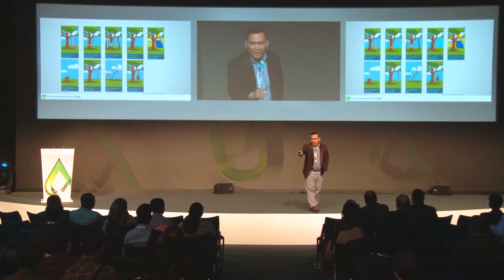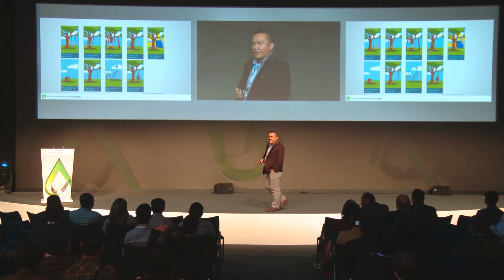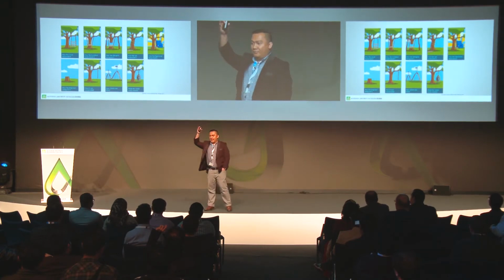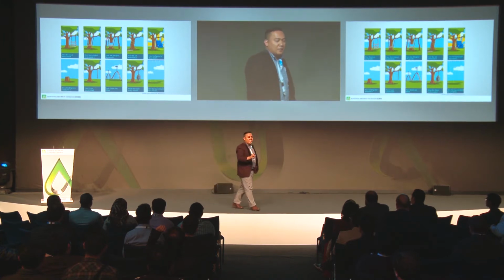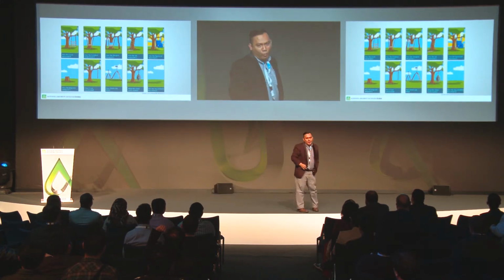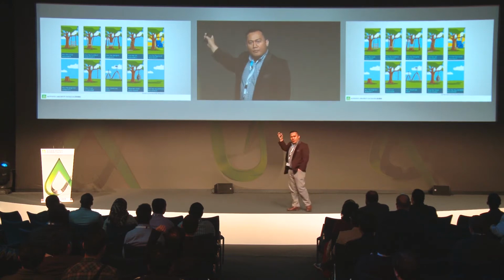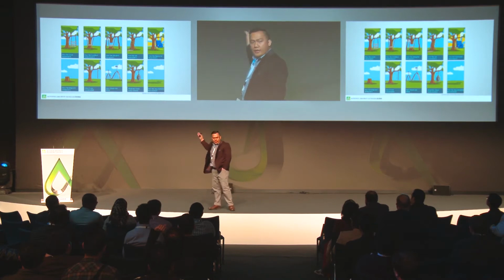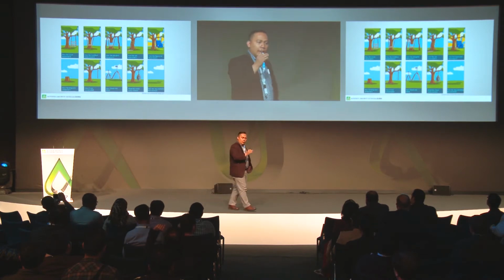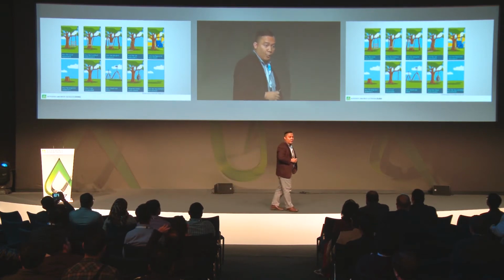Lack of communication, correct? Any idea? Guys there, any idea? It is basically the undocumented requirements. Now most of the time, project delays and cost overruns are caused by these undocumented requirements. And it is quite the same with all BIM projects as well.